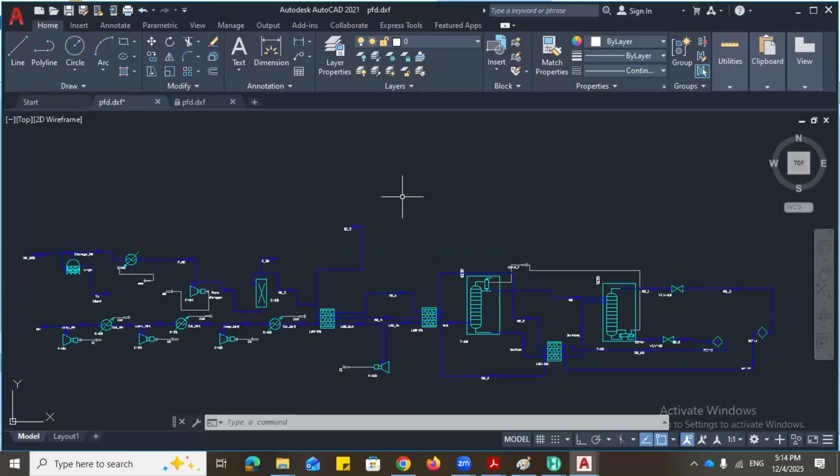So this is what we call PFD. PFD is one of the process deliverables we generate from the simulation. Take note of that. When you are done with your conceptual stage of design, before you move to your feed, one of the inputs required in the feed stage is your process flow diagram. It's from this process flow diagram we are going to start to deliver our P&ID.